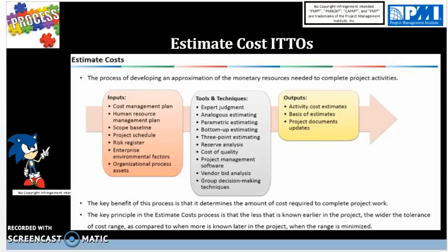So that's really important to know: in the WBS, we are using that here to estimate costs, and at the project level, we have rough order of magnitude. When we get to the control account level, we have budgetary estimates. Then at the work package level, we have the definitive estimate. So keep that in mind when you're estimating costs. The more detailed you have it, the better off you are in terms of having an accurate budget that you will develop next.